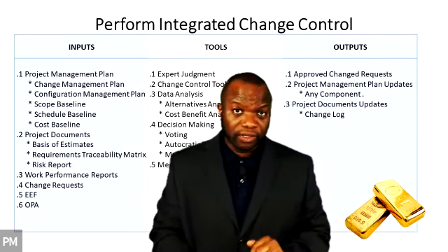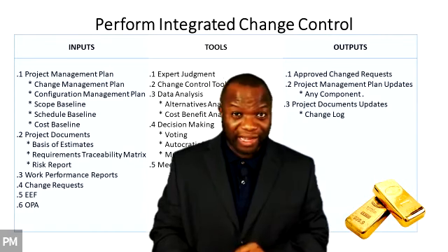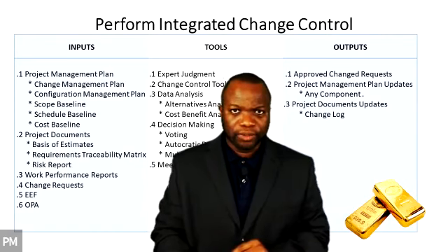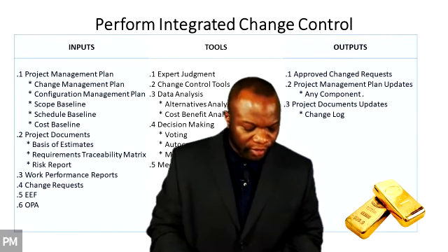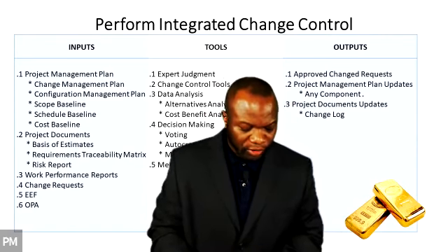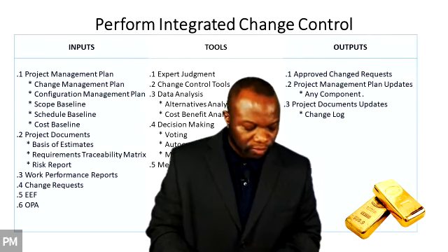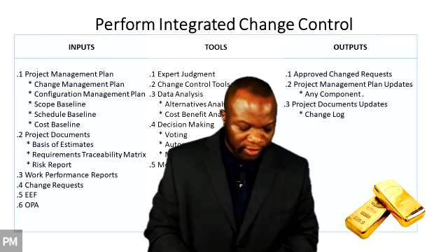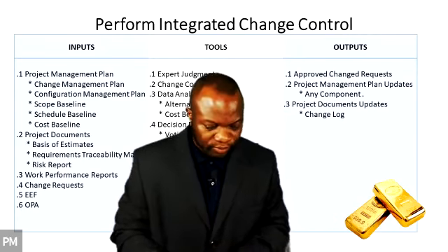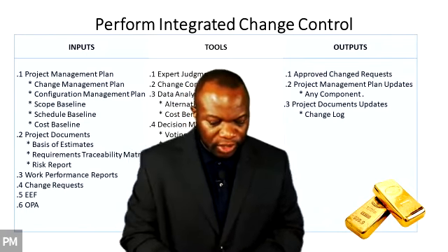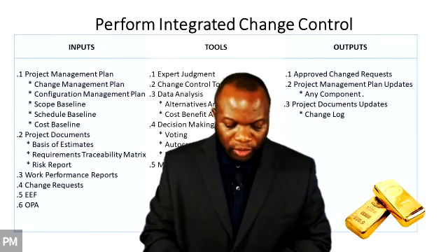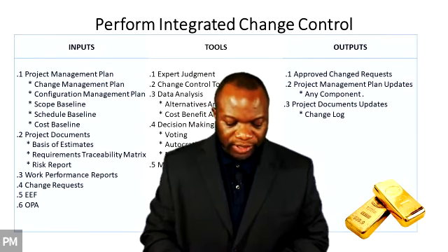Highlight this. You got a highlighter? I hope you've been highlighting all the stuff I've been telling you. Hopefully. All right. It says identify configuration item, record and report configuration item status, perform configuration item verification and audit. And then it goes on to page 119 and says tools should support the following change management activities as well.